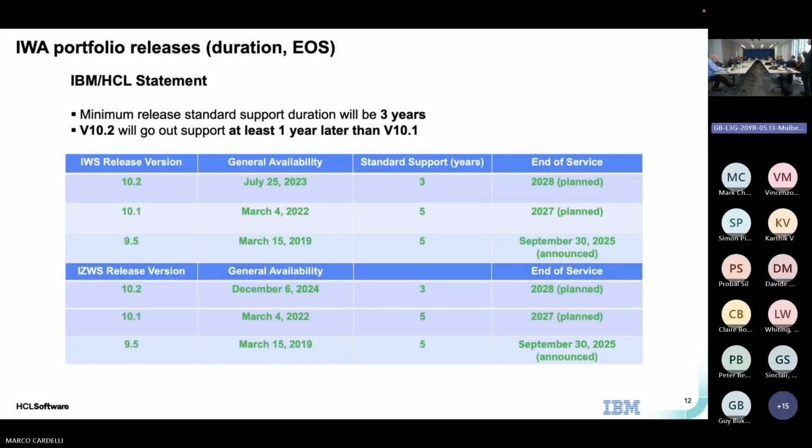We thought we could get that done in about 6 months, and we are nowhere near. It's going to take us years because of the analysis of the batch that we have to do with each individual application team, hundreds of times over, and then redevelop those before we can even do the change. And then we've got twice as many on distributed that we need to do. So it's going to take us years.